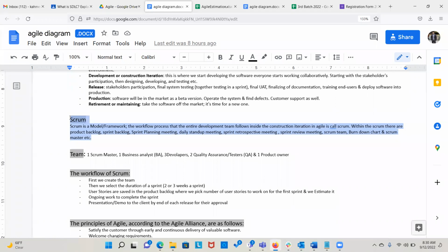So we should not really have too many people working in one team. Agile is very, very organized, and they like to have everything organized, even the team. Ideally, the entire Scrum team should be 7 to 9 people. If it's more than that, it's not really a pure Agile Scrum team.